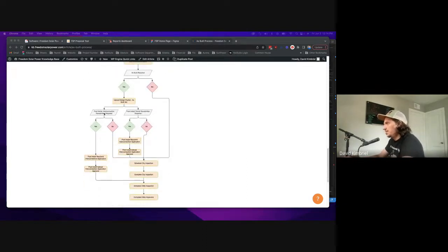The post-install interconnection resubmittal flow, which will have a post-install resubmit interconnection application task and post-install upload interconnection application approval. So this is if you said there was a post-install interconnection resubmittal required, it will do this and it will block schedule utility inspection. So you will not be prompted to schedule utility inspection until the CAM team has resubmitted the interconnection application and uploaded a new approval.